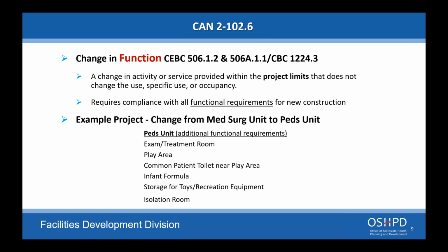And like I said, I've literally turned away projects that were 100% cosmetic upgrades because they thought they had to submit a project. Another example is if you're doing tile work in a toilet room, you're remodeling it, or not remodeling, but basically doing cosmetic only in a toilet. You're removing the tiles, and to do that, you have to remove the hand washing fixture and the toilet.